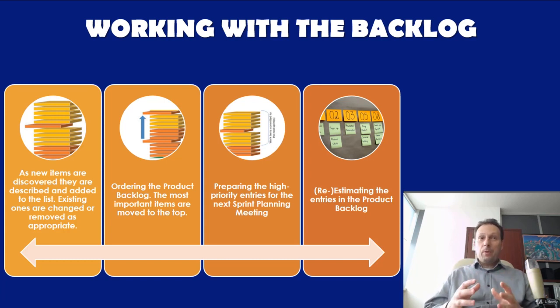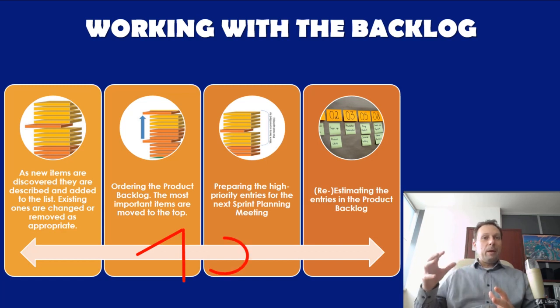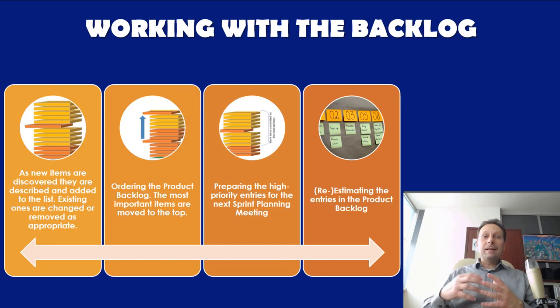That is a collaborative process. When using the Scrum framework, about 10% of the Scrum team's total time should be reserved for maintaining the product backlog, discussion, estimation, etc. The collaborative maintenance of the Scrum product backlog helps to clarify the requirements and creates the buy-in from the Scrum team.